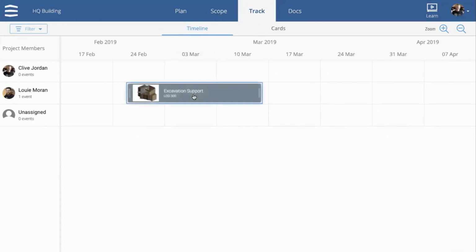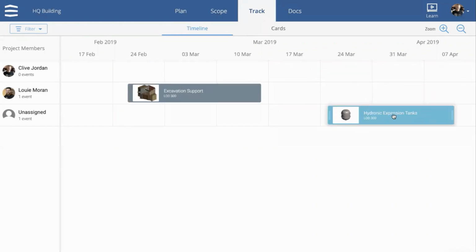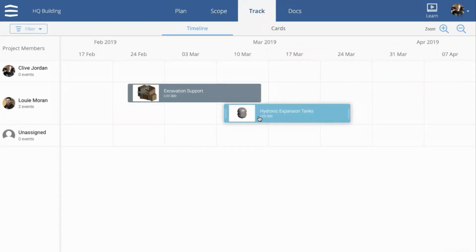Now I'm going to assign this to Louis, obviously. I'm going to assign things to myself. And then these tasks are being shared because Louis is assigning some dates, and I can add these to the board and start to work with them individually. This is just a massive improvement because now you can not only assign it to a person, but you can also assign it a date, and you can also start working with the cards in that simple environment to update progress. So you can imagine how the set of content in the timeline gets a lot larger.